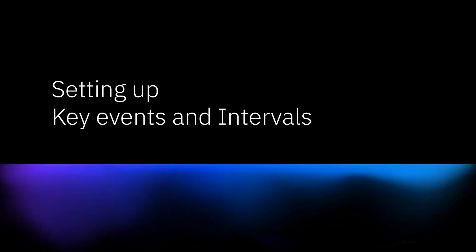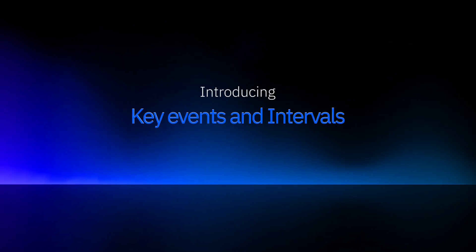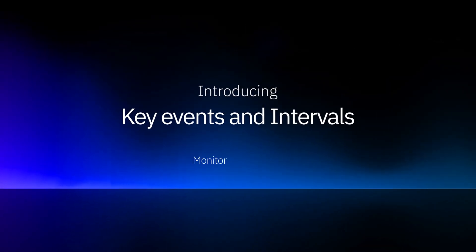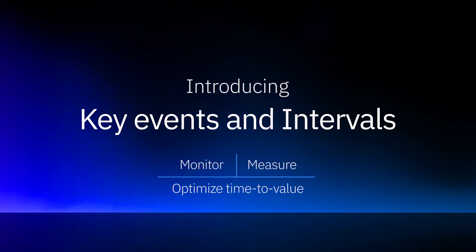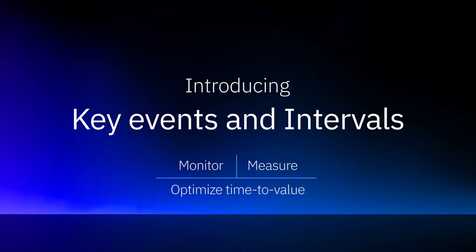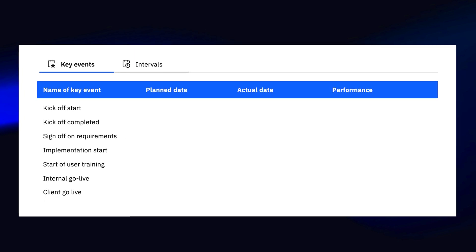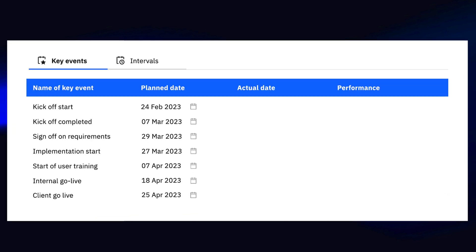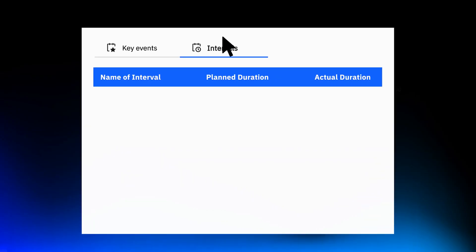In this video we will learn how to set up key events and intervals for measuring your project performance. Rocketlane introduces key events and intervals to provide a clear and logic-loaded understanding of areas in your projects where you spend more than the estimated time. These key events capture the start and end date of your project's tasks, phases, and milestones, and flag any delay in starting or completing important milestones.